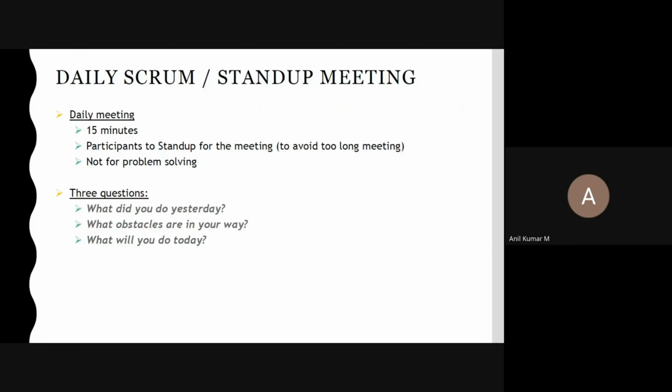So daily, now our office is starting at 10 a.m. So everybody is at office at 10 a.m. Someone might be getting late, so we'll have a buffer time of 15 minutes. So 10:15 to 10:30, we have the daily scrum meeting. It's a 15 minutes meeting. In this meeting, we are not discussing the solutions of the problems we faced.